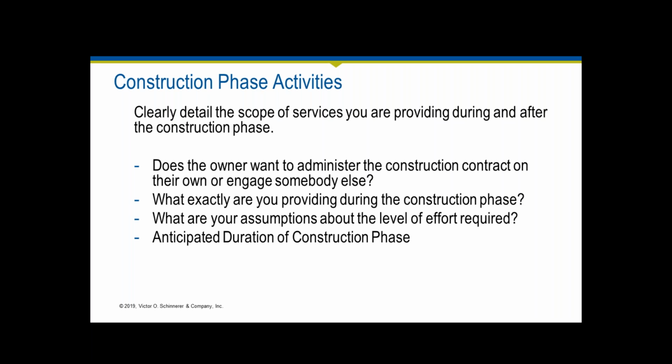It doesn't mean that because it went over 9 months that it's your responsibility, but if there are things that happen on site and it takes longer and your involvement on site or during the construction phase is longer, then that needs to be recognized, and that should be an additional service or an opportunity to revise what it is that you're providing so that you can make sure that this phase still remains profitable for you. So I think one of the things that design firms should certainly advise the owner on and be advised on is, how long do you anticipate the construction phase services to last?